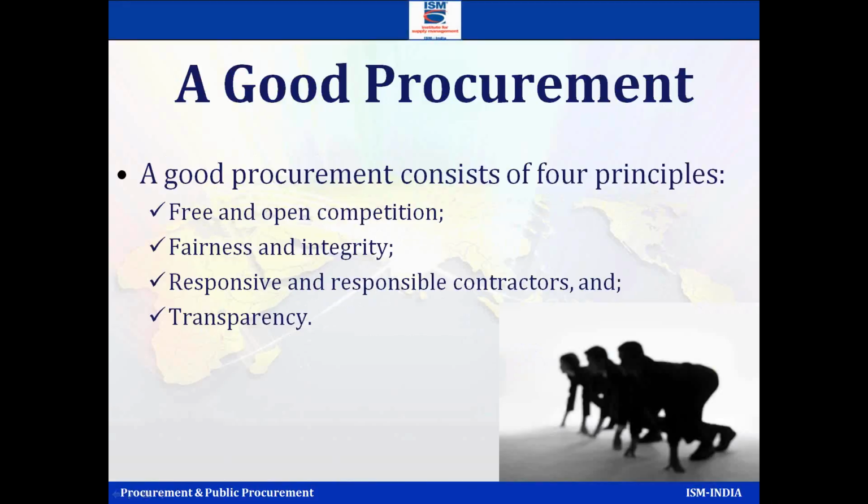Next comes the transparency part. The process has to be transparent. Everything has to be transparent. So if one supplier writes me an email, can I get this clarification? We give a clarification. But that clarification should go to all, even if they have not asked the question. So that we are basically trying to create a level playing field. Nobody gets extra advantage just because they asked a question.